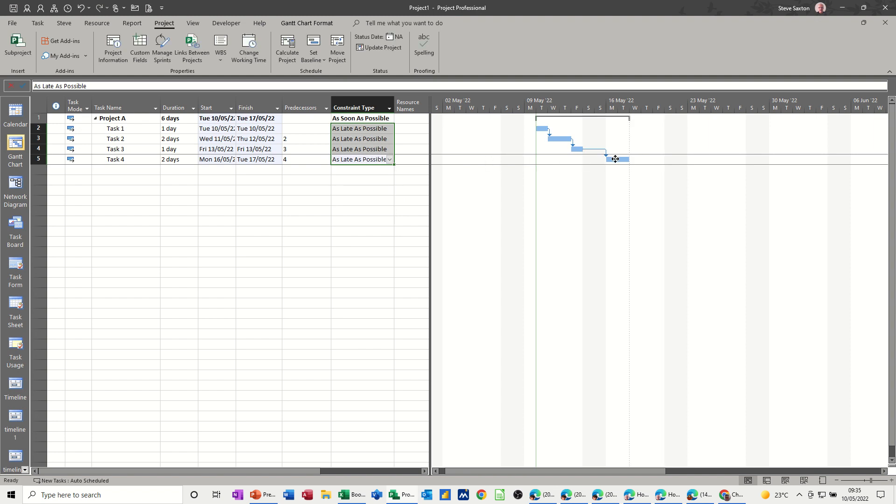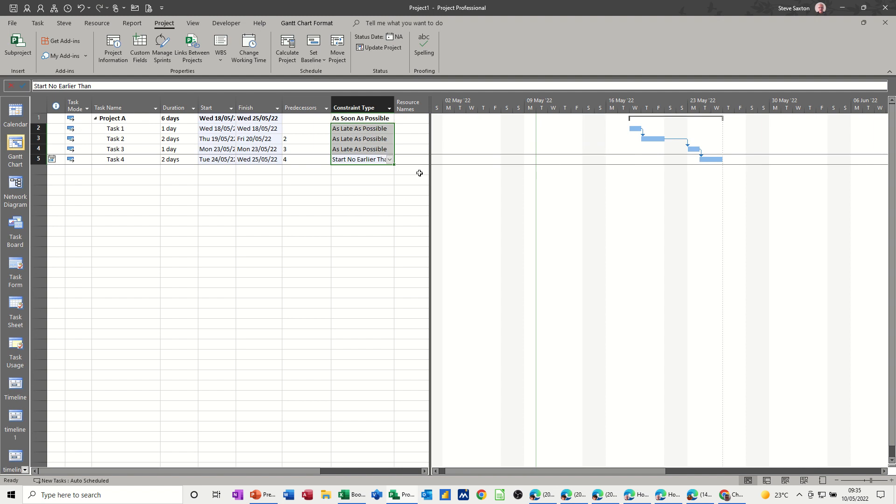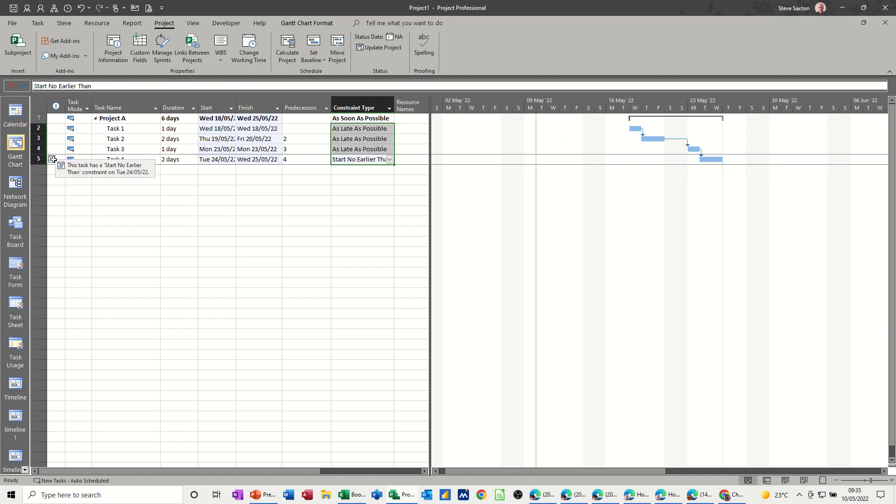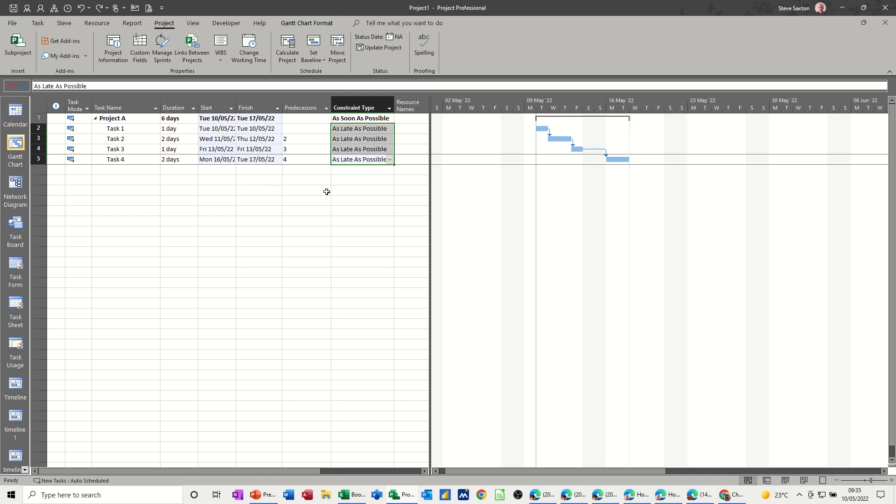That changed, if I pull this into next week, starting earlier than. So it went from as late as possible to starting earlier than, because I'm physically moving the date, and that's putting a constraint on. So if I undo this, and just show that again, it happens whenever you move a task, not just this example.